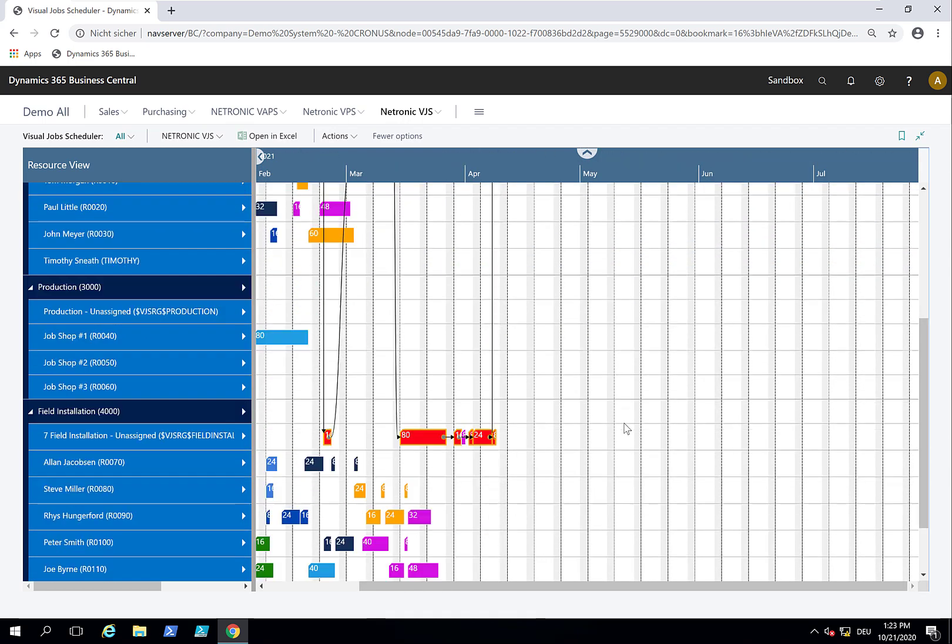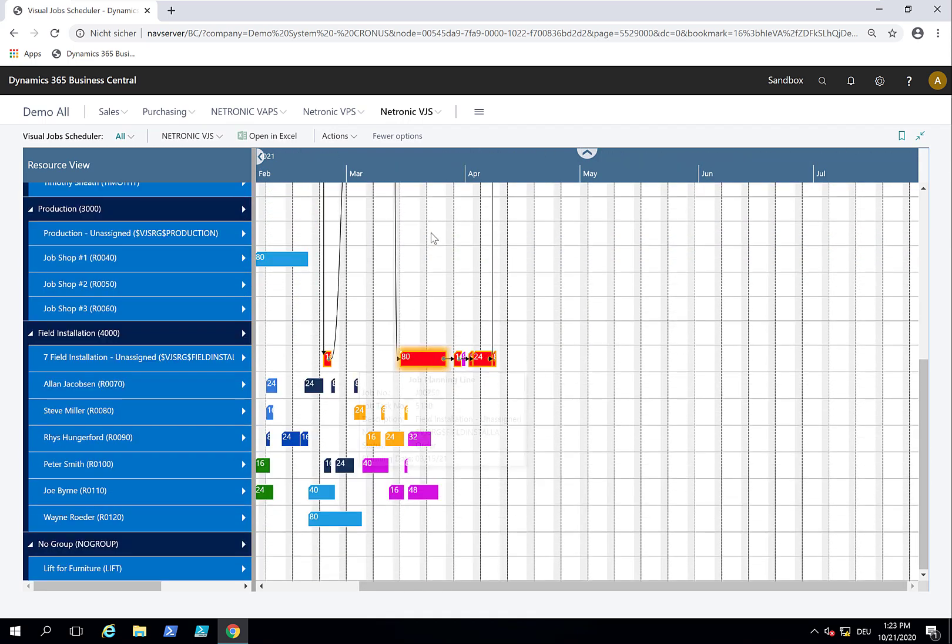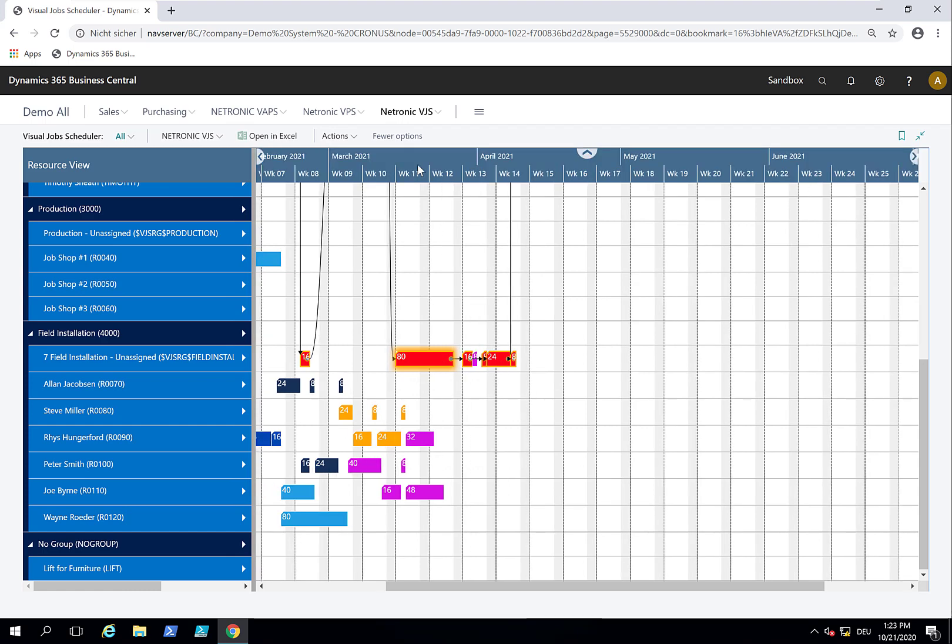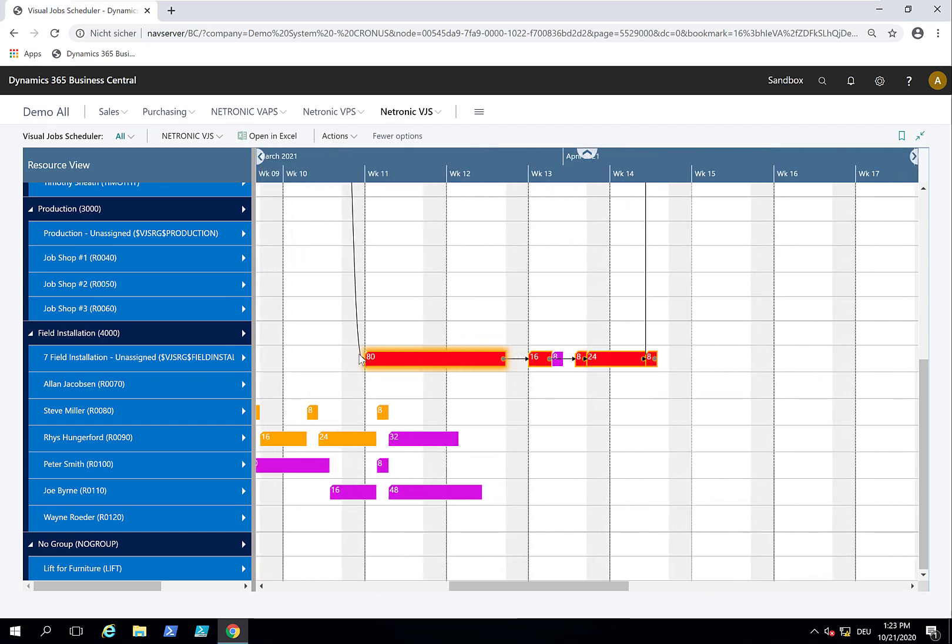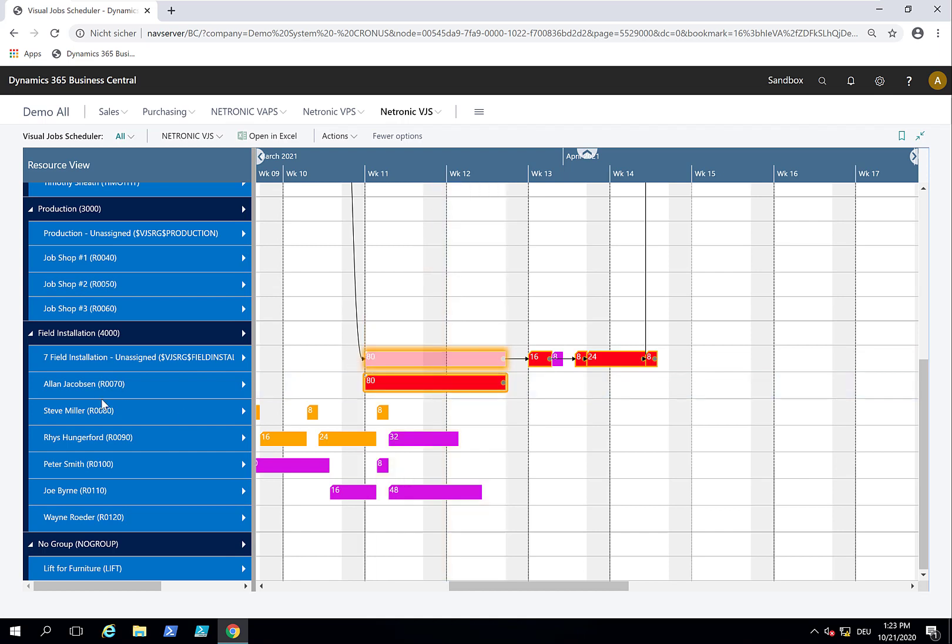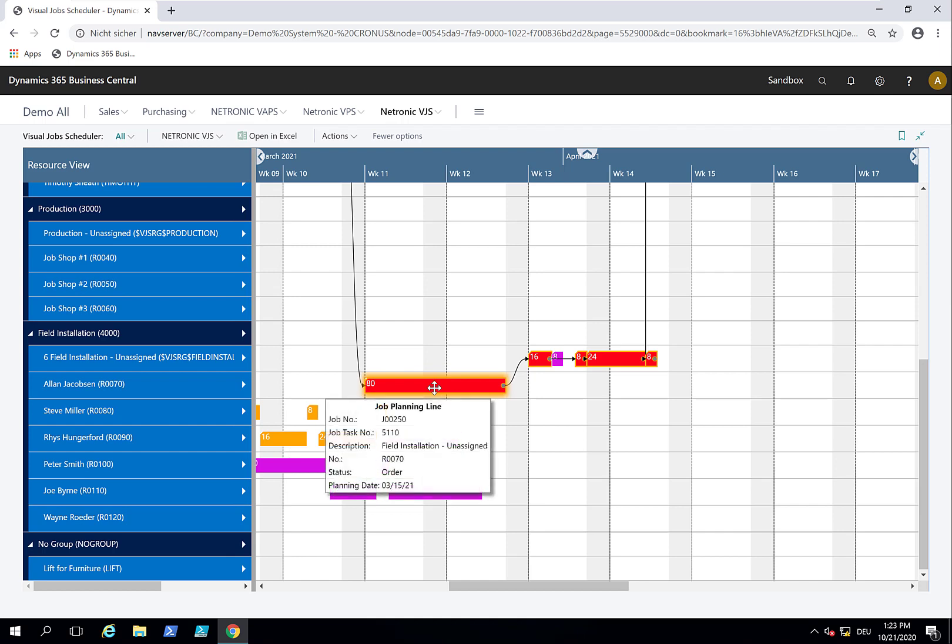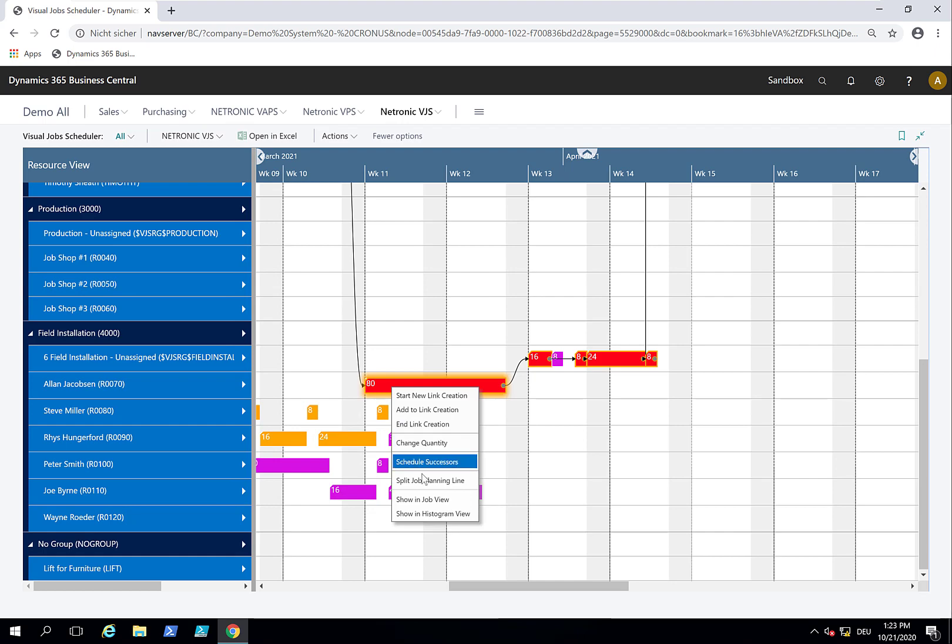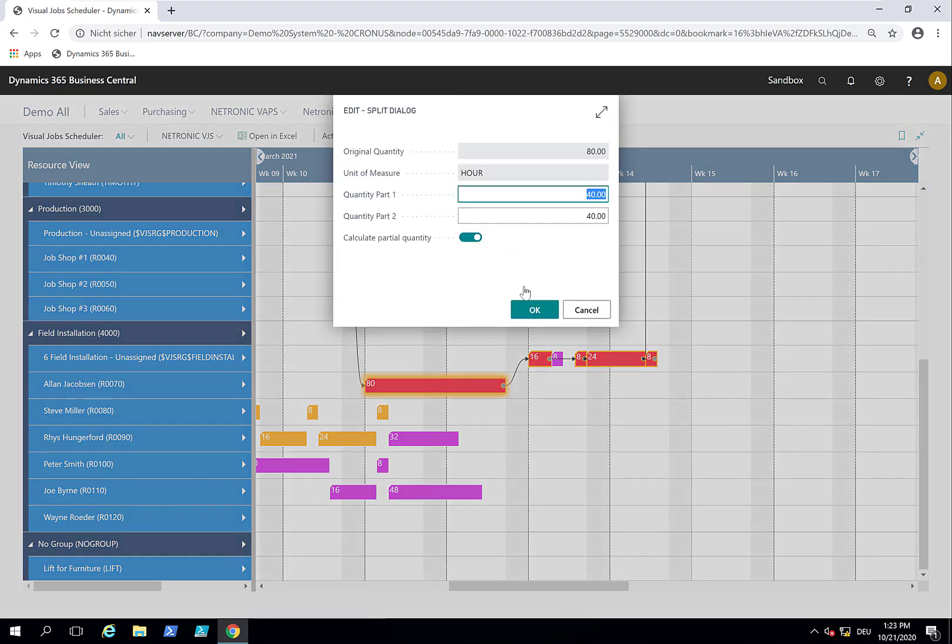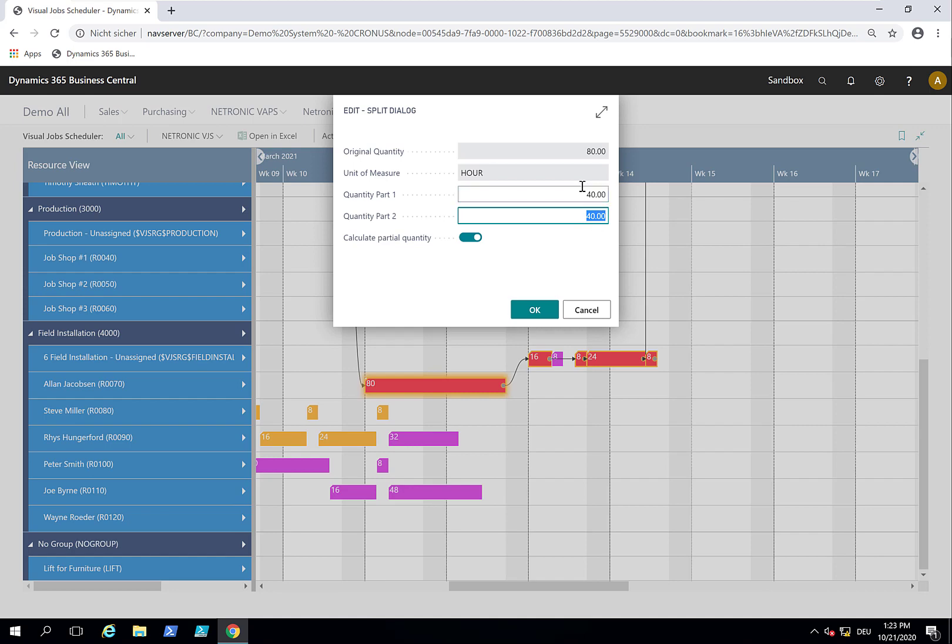Let's look at this big thing that takes two weeks. Initially I said Alan will do the job, but now the customer calls and says could you send two people instead so you get this done within the week? I need to split this and assign it to a free resource. I see Wayne is free. I split the job planning line. It gives me an equal distribution, but I say 60, and it calculates the remaining quantity. Now I split it 40-40.